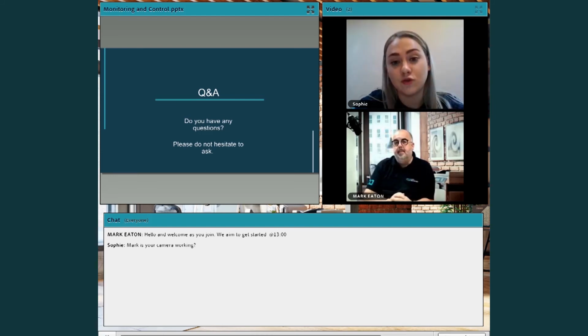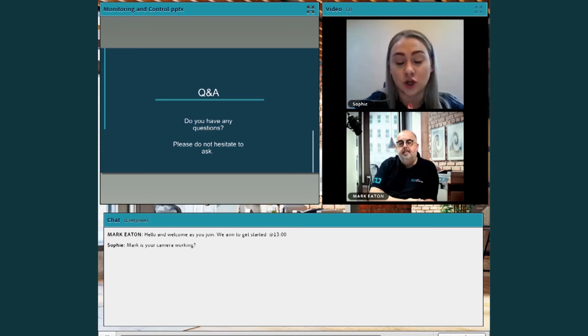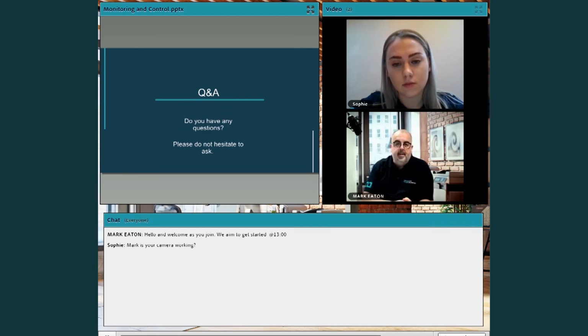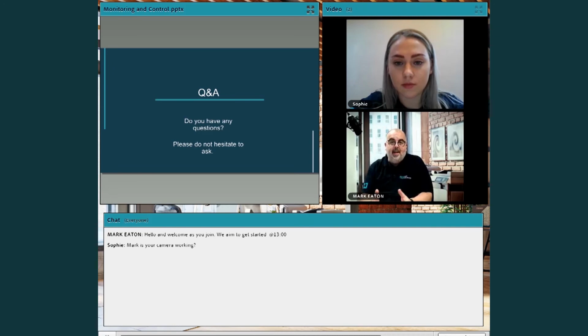What would you advise then if you had a sponsor that wouldn't engage, and no matter what you tried as the project manager to get them engaged, you just couldn't get them on board? What would you do in that situation? My favourite quote out of all the manuals that we deliver courses on, from the Agile Project Management course, is, tough love. Don't make the decision. As a project manager, as an employee, that's very difficult. But it's actually making sure that the values and priorities of the organisation are being put first by making sure the sponsor makes the decision. As a project manager, I won't close a project down until the sponsor says so. I will email them, I will ring them, I'll go knock on their door, I'll give them a coffee, and I'll keep advising them, but until they say close it down, I won't.